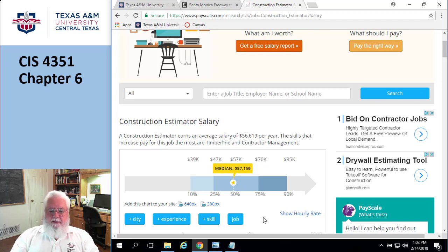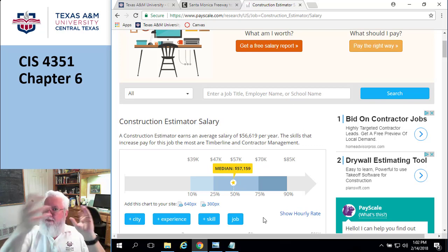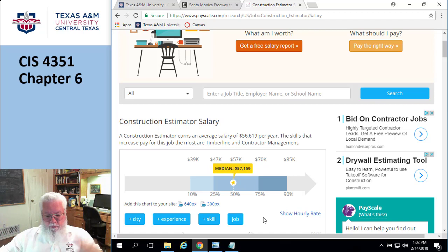So one more time, just like we had a work breakdown structure, they're recommending something kind of similar. They call it a resource breakdown structure. And basically it's used by categories. In other words, you don't normally go down to a person. You say carpenter or finish carpenter or electrician or plumber or whatever. In other words, a group of people that have those skills. And so if, for example, you have 15 carpenters on your crew, but you're doing 3 houses, that means 5 carpenters over here and 5 carpenters over here. You could front load them, have 10 carpenters over here one day, and then no carpenters one day. You need to know what are the numbers of carpenters you have available.